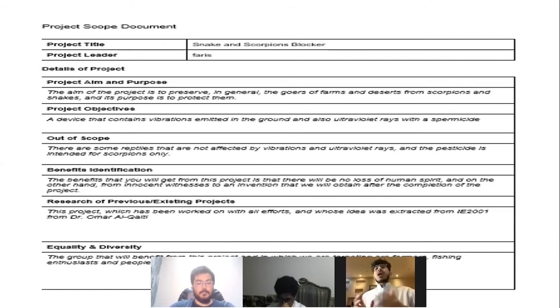And the fourth thing is the project deliverables, the direct output of the project, which means the product, service, or result. The fifth thing is project exclusions. It is a very important subtopic that sets stakeholder expectations about what is not a part of the deliverables.